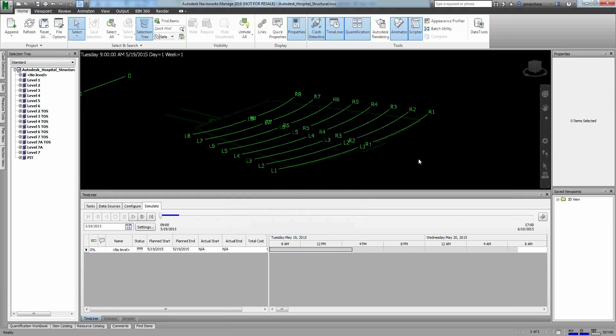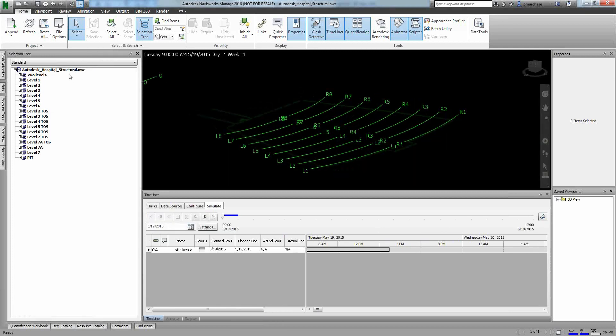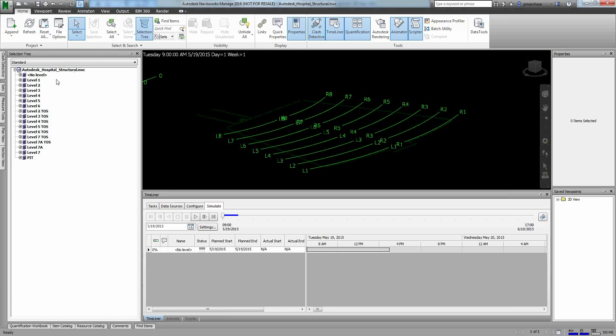Now, in terms of the updates, I mentioned before how all I'd need to do was say refresh. So a question came in regarding the manager would have to save over the sub's last file in order to get that. Yes and no. So the easiest thing that you would end up doing - you can see that the file that I'm working with is the hospital structural. What I would want to end up doing is overwriting that. So inside my project folder, I would just lay the new one on top of that. It just makes it a little bit easier. A lot of the times when people submit files that may be appended to date, I might download that file, put it in a project file, and then make a copy of that without the number, and then put it into the actual project directory. So this is much easier to work with. And also so the software just refreshes as opposed to starts looking for different information.